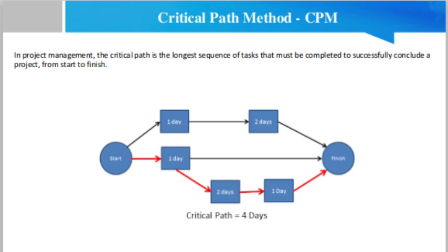Then you can allocate the necessary resources to get these important tasks done. Tasks you discover that are not on the critical path are of lesser priority in your project plan and can be delayed if they are causing the project team to become overallocated.